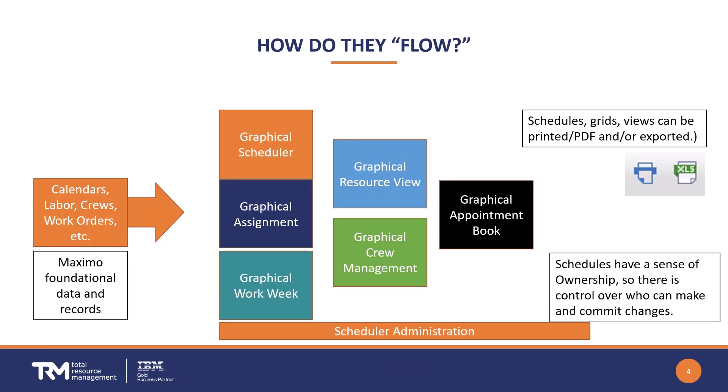So how do all these applications fit together? When you look at them in the menu in the product, they're not in any particular order. Take a look at this diagram — it will give you a sense of where you would start and how you would evolve your usage of these different apps. On the left-hand side, as we've mentioned and will continue to mention, the record quality of your calendars, labor records, work orders, and things like that need to be in pretty good shape in order to pull them into the different graphical applications. Once you're in good shape there, it's a matter of using initially the graphical scheduler, which would probably be the very first application and the one you'll use the most.